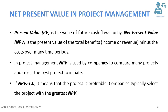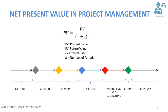NPV is also used to compare projects and pick the most profitable one. If NPV is greater than zero it means that the project is profitable. If the value is less than zero it means that the project is not profitable — it will make losses for the company. If there are many projects each with a positive NPV, the company will choose the project with the higher NPV.